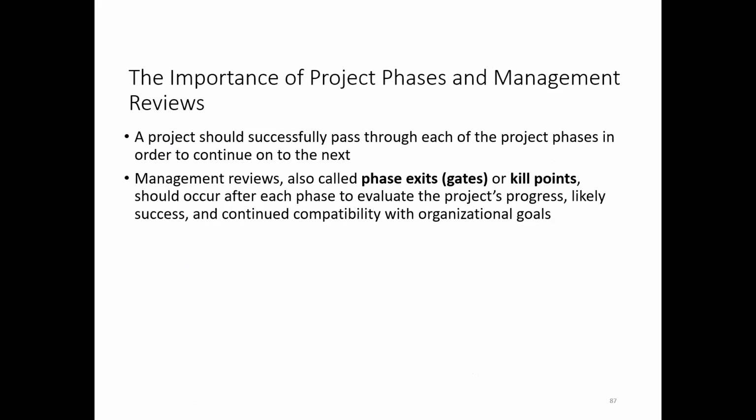A project should successfully pass through each of the project phases in order to continue on to the next. Management reviews are also called phase exit gates or kill points, and should occur after each phase to evaluate the project's progress, likely success, and continued compatibility with organizational goals.